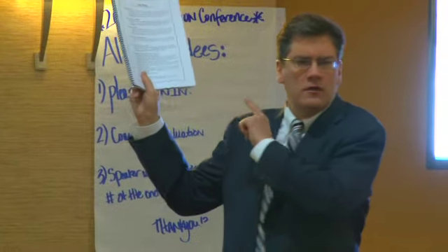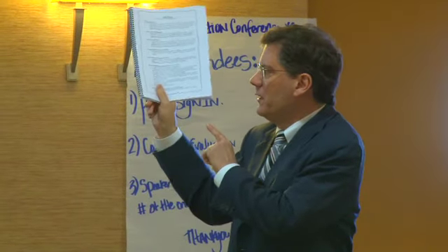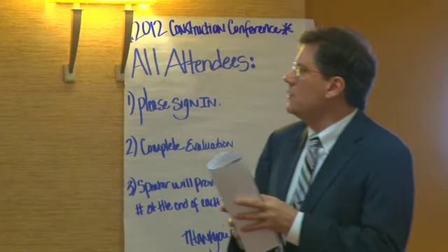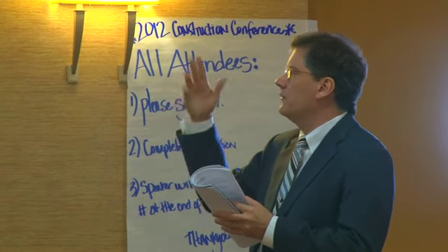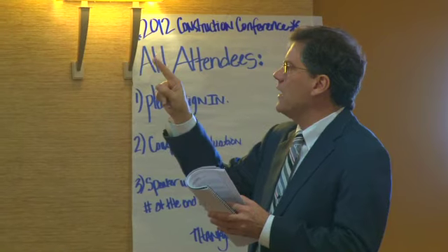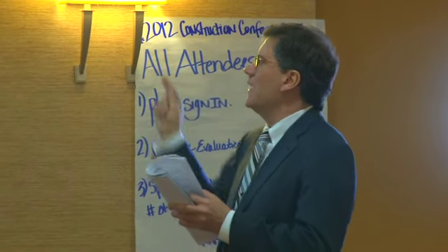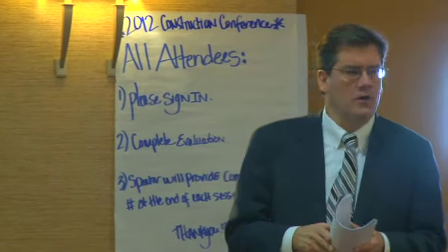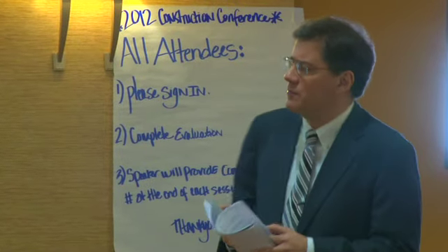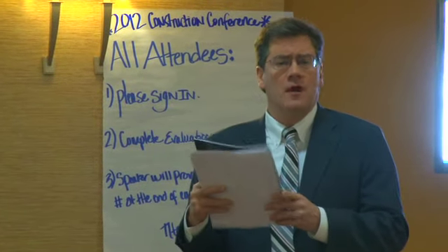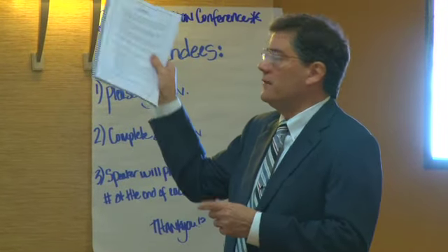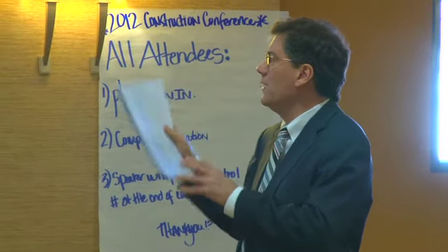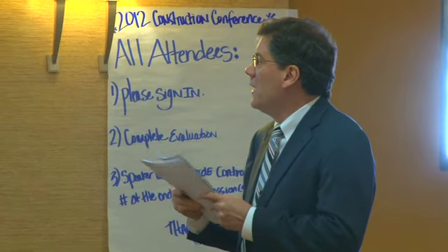The rights where you can use a stop notice are the same places where you can record a lien claim. Who can use them? Any person entitled to record a claim of lien under Article 6 of this chapter, other than the original contractor, may issue a stop notice against the owner. Issue a stop notice. What are you talking about? Well, you're going to mail the stop notice. You're going to serve it with proof of service on the owner, and then they've got to hold that money with the equivalent value of the stop notice.